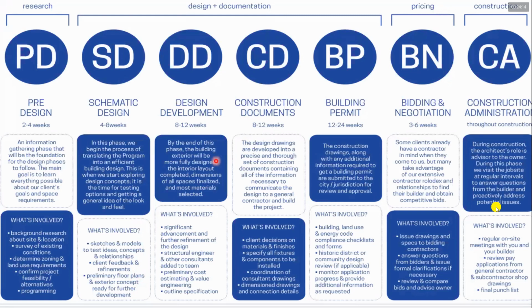By the end of this phase, design development, the building is fully designed: the interior and exterior layout, the fixture details, dimensioning, all features, and selected materials are complete. So it's a very milestone phase where all advancement and refinement is done, and here you coordinate with all the relevant consultants along with the cost estimation and value of the project.